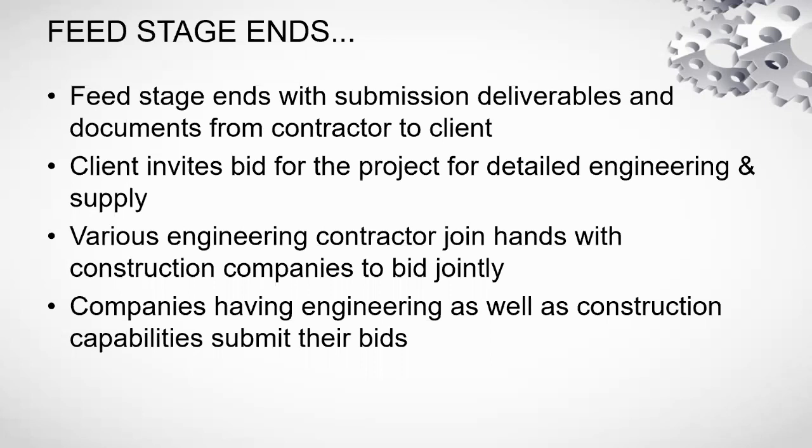Now, this is the point wherein there are various submission methodologies followed by companies. Like in Aramco, they call it stage-wise submission, 30, 60, 90, and they expect every document which is listed or expected to be submitted at that stage to be submitted at the same time.